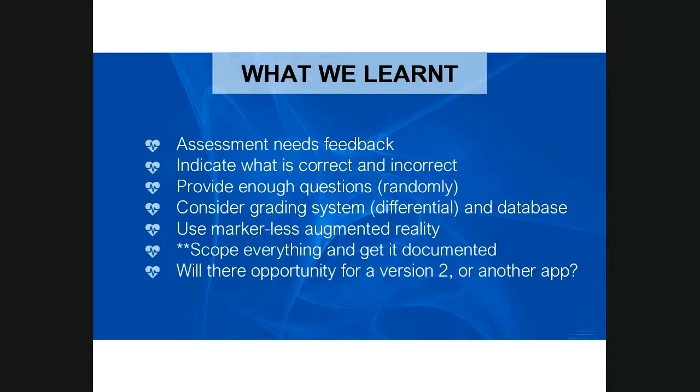I've highlighted that idea of scope everything and get it documented. Very important to have everything nutted out initially, and in our new Oculus Sim app, we scoped that project and then sat down with the vendor to make sure that we all knew what the implications were of what we were doing, how we were designing the app and the pedagogy behind it. And the other thing we didn't think a lot about was, will we have version 2?